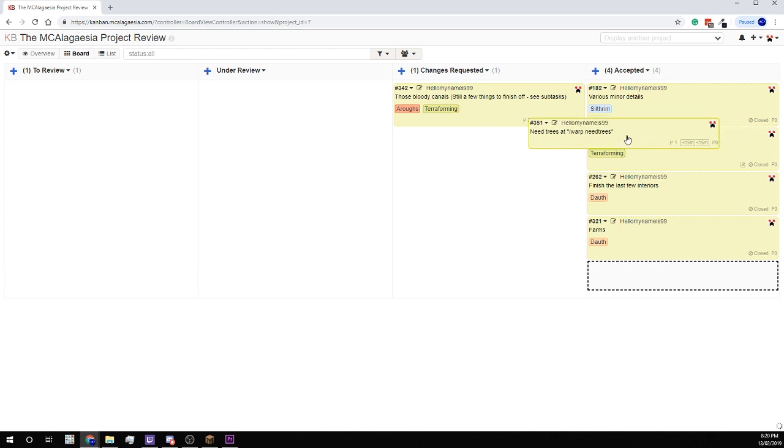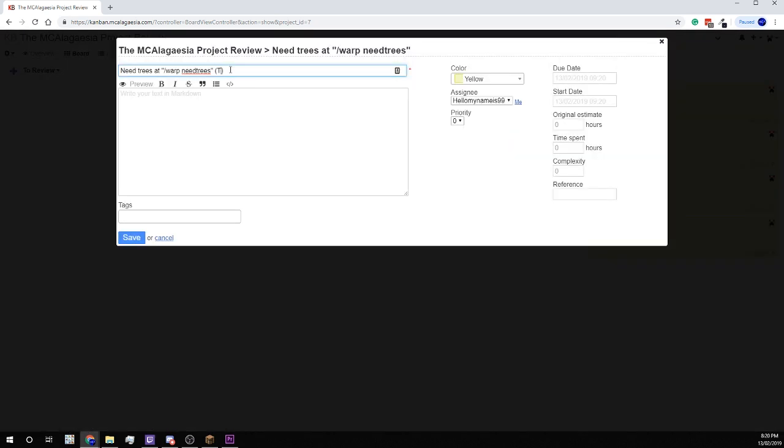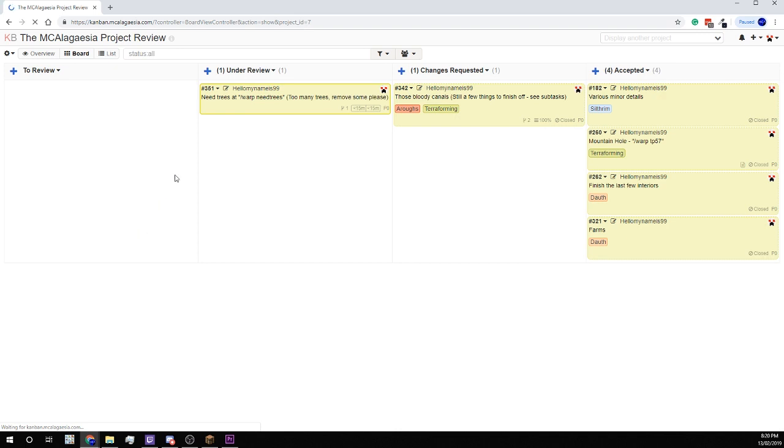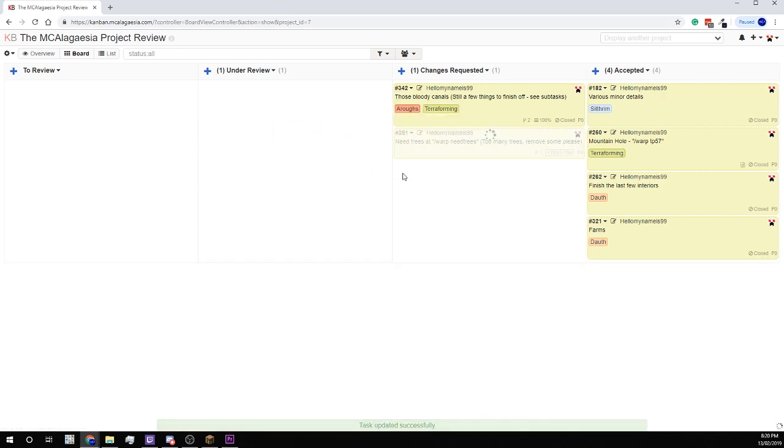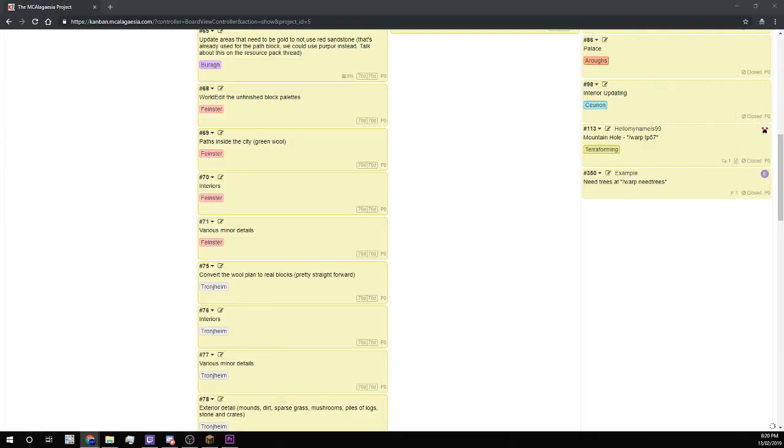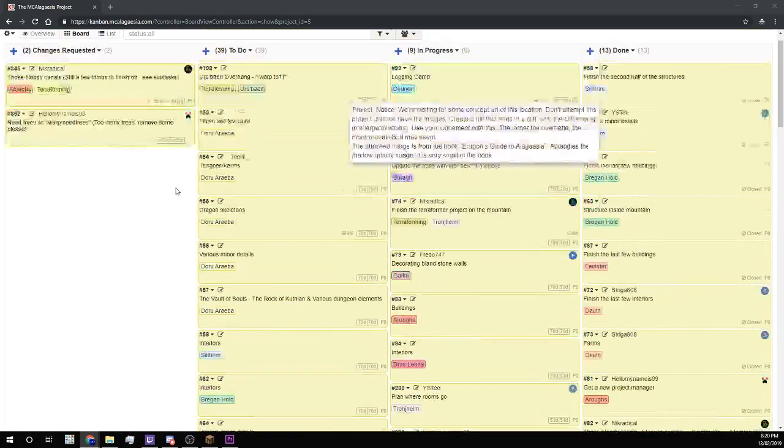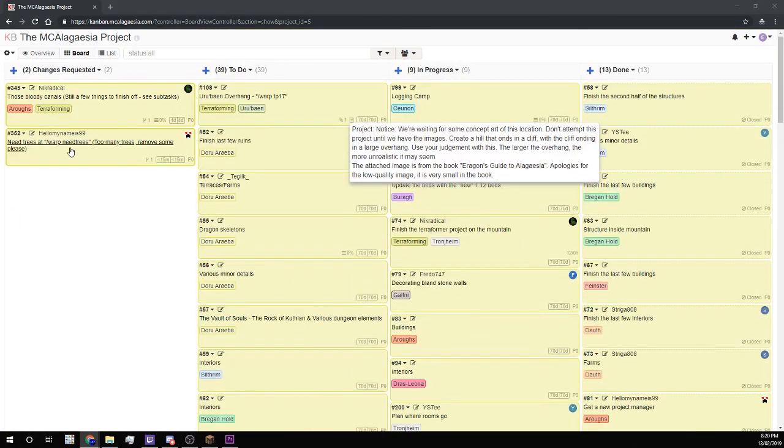If there is a problem, I'll edit the task and put it in here with Changes Requested. And that means the task will appear back over here in the Changes Requested column for anyone to work on.